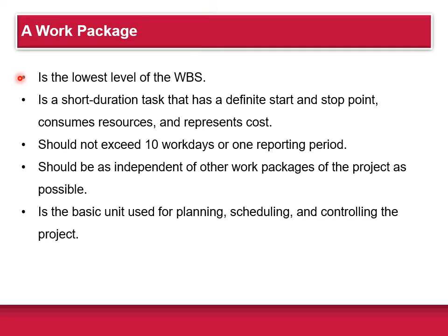The lowest level of the work breakdown structure is called the work packages. Work packages are short duration tasks that have a definite start and stop point, consume resources, and represent cost. Each work package is a control point, and a work package manager is responsible for seeing that the package is completed on time, within budget, and according to technical specification. Practice usually suggests that a work package should not exceed 10 work days or 1 reporting period. It becomes much more efficient that way.